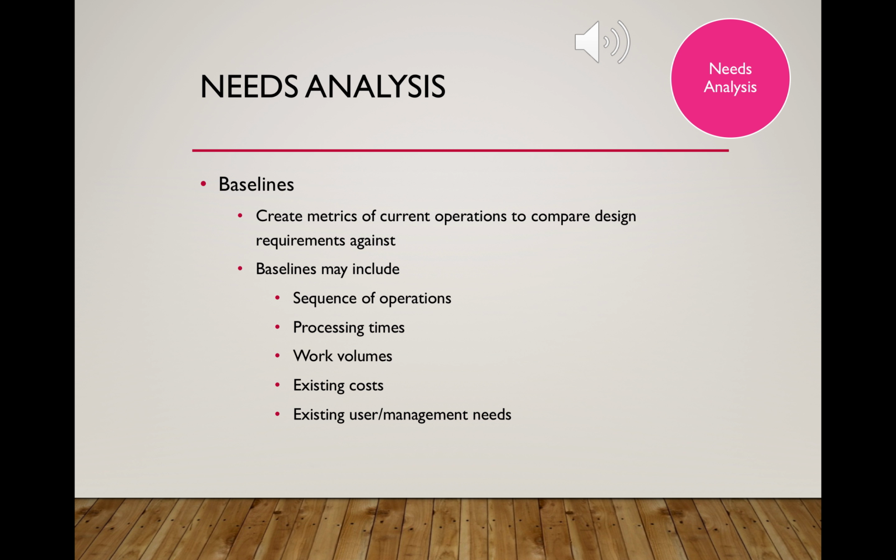When doing the needs analysis, baselines have to be considered. Baselines create metrics of current operations to compare design requirements against. If you don't have a good solid understanding of where your current operations are and what speeds it has, you have no idea of what you want to achieve and how much better. You can't just say, I want it to be faster. That's not good enough.